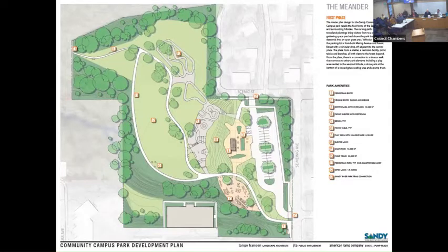And along Scenic, we'll be doing three-quarter street improvements, which will include a sidewalk and curb on our side, enough room for parking on both the south side and the north side, and then two travel lanes. Essentially from curb to curb, we'll have a roadway along Scenic, which will tie in perfectly with our entrance there.